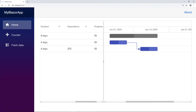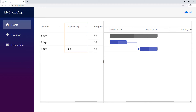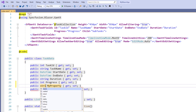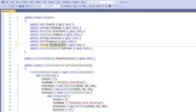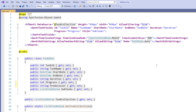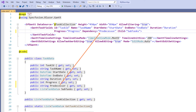Now let me show you how to edit the predecessor. As I explained in my data binding video, predecessor is a field that contains information about the task ID that precedes a task. This helps the Gantt chart identify the predecessor tasks from the data source and draw dependency arrow marks between tasks. So let me add the predecessor field to my data source. In the task data class, I add a predecessor property of type string. In the data creation method for the third task, I add the predecessor property and set the value with the task ID value 2. To show this column in the Gantt chart's tree grid, in the Gantt task field tag, I set the dependency property with the field name predecessor. Now I run the application.